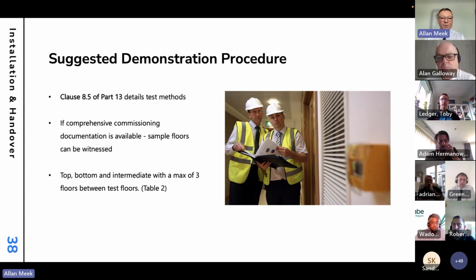And then for a demonstration procedure, we would recommend that clause 8.5 of Part 13 details the test methods that should be used, and we would expect that there would be a full comprehensive set of documents available before carrying out any witnessing. If that's the case, then we would suggest that sample floors can be witnessed.